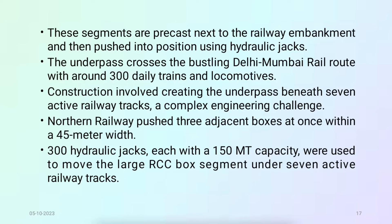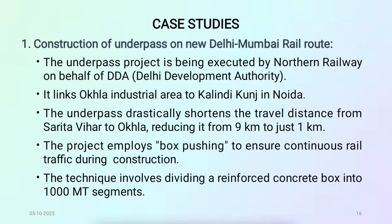The underpass crosses the busy Delhi–Mumbai rail route with around 300 daily trains. Construction involved creating the underpass beneath 7 active rail tracks, a complex engineering challenge. Northern Railway pushed 3 adjacent boxes at once within a 45-meter width. 300 hydraulic jacks, each with a 150 metric ton capacity, were used to move the large RCC box segments under seven active railway tracks. The conclusion of this case study shows that the travel distance from Sarita Vihar to Okhla was reduced from 9 km to just 1 km using box pushing technology.